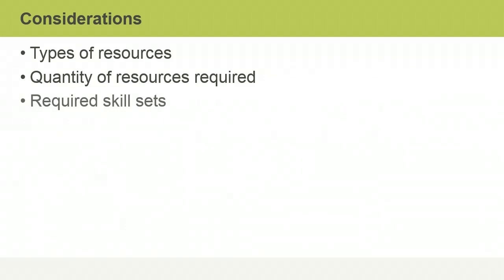The manager needs to determine the skill sets that are required to perform each activity so appropriate human resources can be identified. The level of skill required will have an important impact on the budget. For example, if the project requires technical drawings to be compiled, does this require an architect or is it something that a technical draftsperson can do?